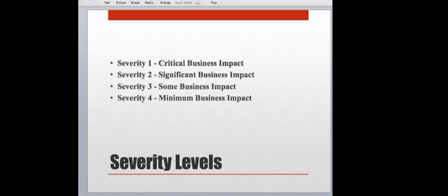Sometimes what I would do is save part of the day, at the end of the day, for a recap, right? So we're not just going to talk about how testing went, but we're also going to talk about what enhancements were identified during the day as well. That way you are going back over, hey, here's what we accomplished today.